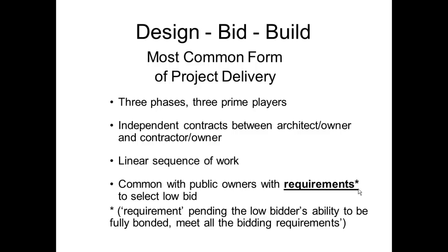And there are ways that we can say, you know that the low bidder is not always the person that gets the project. The university, for instance, reserves the right to reject bids that they feel are not in the best interest of the university. That may get into some legal issues, but we do put that requirement note in there that we do have the right to not accept the lowest bid based on the fact that they may not have the ability to get fully insured and bonded.